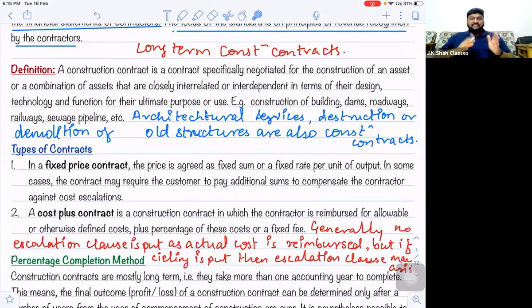Yes, because whenever the situation is like this, the question mark will arise, how much revenue to be recognized in which financial year. Now, say for example, I started a contract in February 21. So Feb 21, March 21 falls in this financial year 2021. Am I correct? And the balance 4 or 5 months will fall in the next year, that is April, May, June, July. Say 4 months fall in the next year, that is your year 21-22. So technically, how much revenue should be recorded?